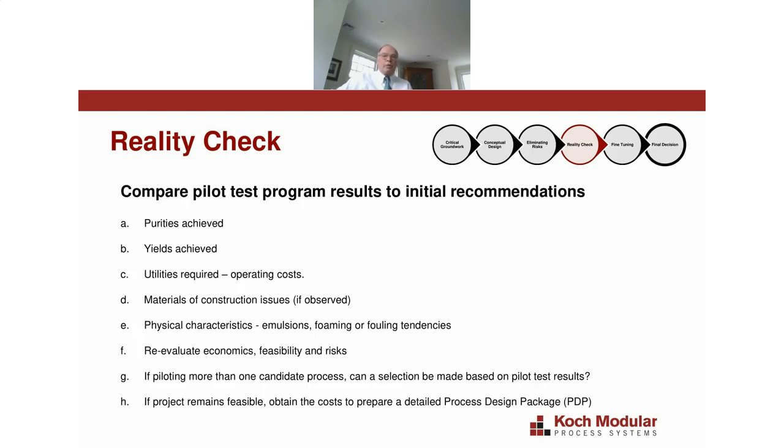So the next step, if we do the pilot testing, is to compare what we found versus what we modeled, and then make any adjustments to the process design, the cost estimate, and the quantity of utilities that are used in the process.